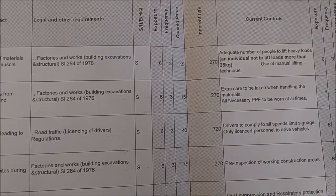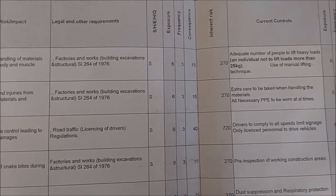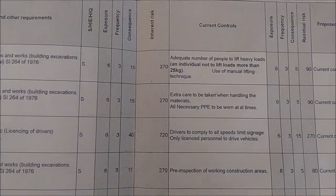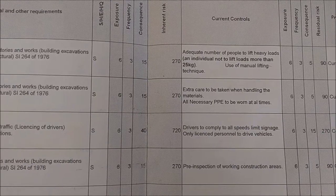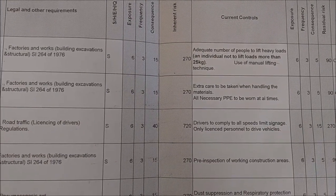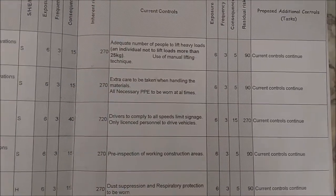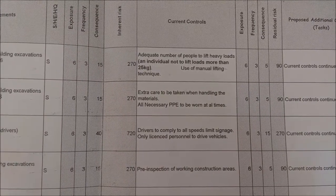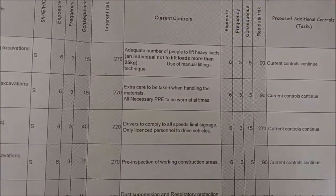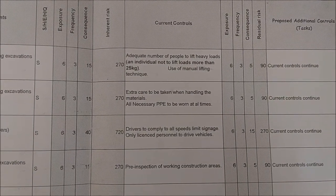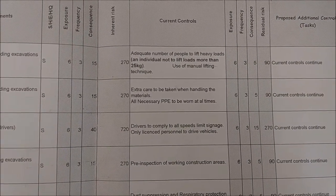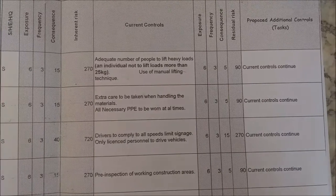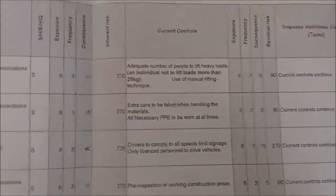The next columns cover exposure, frequency, and consequence, then the inherent risk — this is the risk that exists before any controls are put in place. When controls are put in place, the current controls column notes things like having an adequate number of people to lift heavy loads. Then another set of exposure, frequency, and consequence columns calculates the residual risk — the risk that remains after putting controls in place.